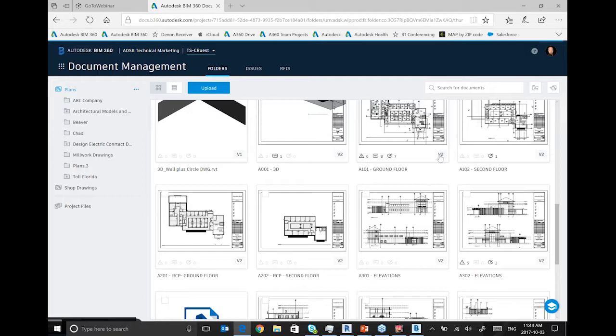As you change the contract and you amend the documents inside that contract, we will keep historical the old versions and the new versions. And the comments, until they're closed, the comments and markups will continue up into other versions. Once a comment or an issue is closed, it will stop at that issue because you don't want to necessarily see the same red line markup going to version 3, version 4.